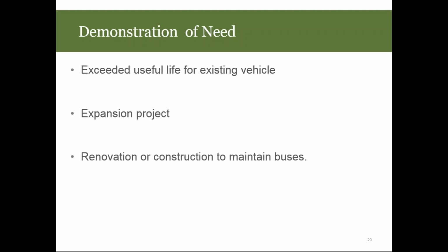An opportunity that instead of replacing in 2017, 2018, a bus that is going to have a 12-year life, replacing that with just a normal diesel bus versus replacing that with a battery electric, I think was powerful. That was a replacement that was going to happen anyway, and why not make that replacement with the battery electric for all the reasons we've been talking about here.